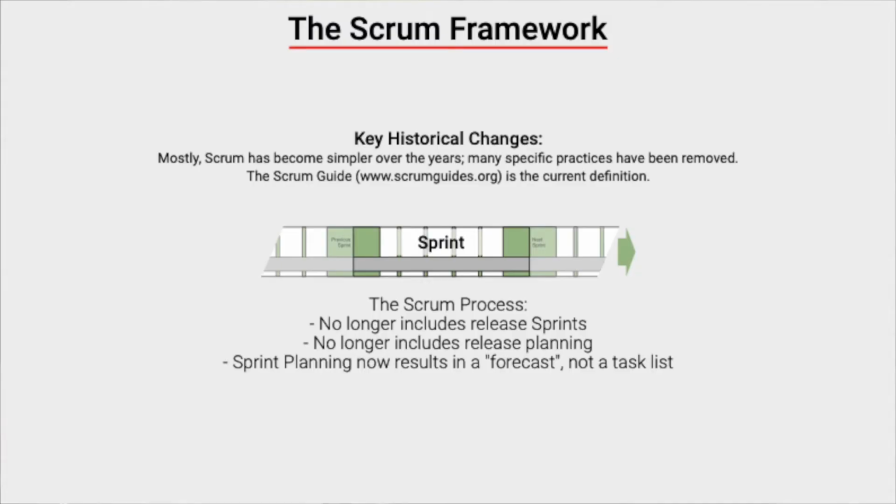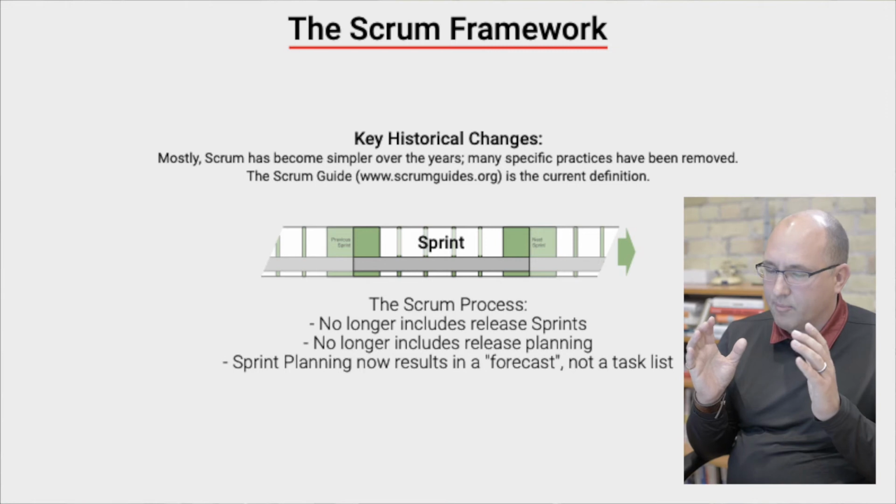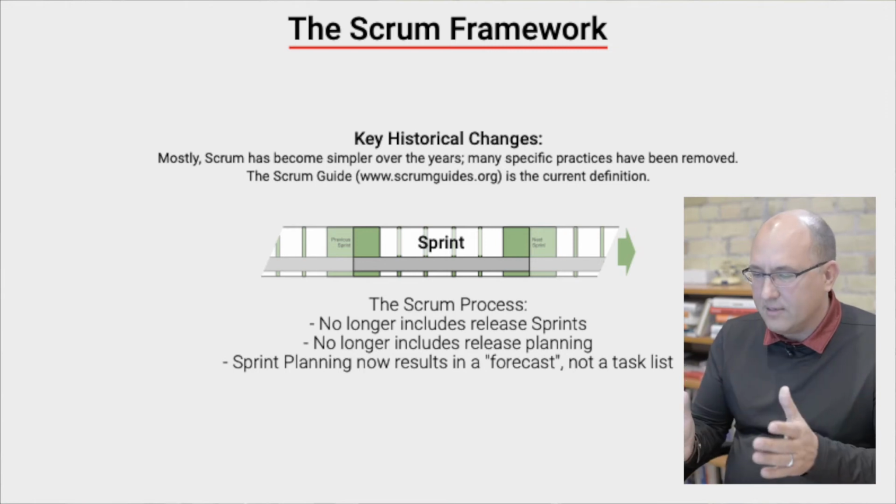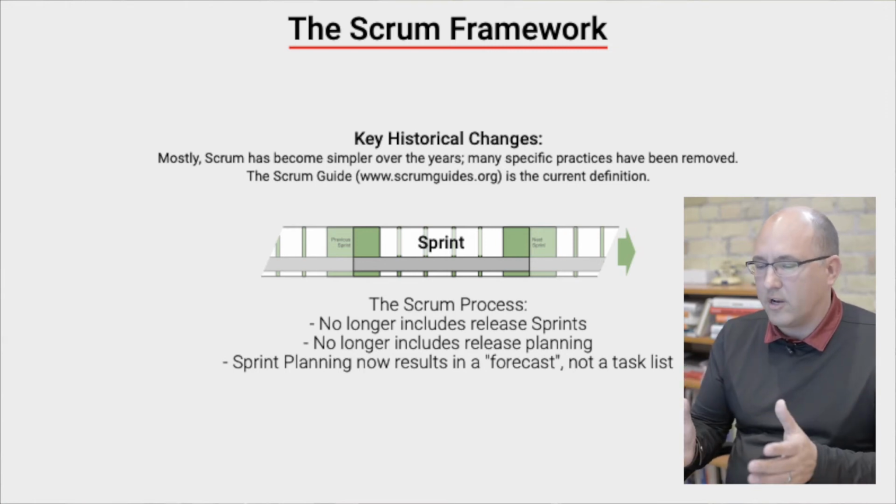And because of that, Scrum no longer includes release planning. That was previously a separate meeting that was conducted by the product owner. Scrum now says, actually, there is no requirement for planning at all from a long-term perspective. Scrum does not require project planning.